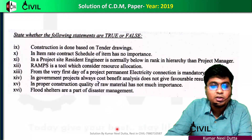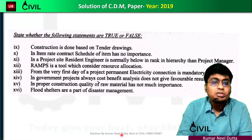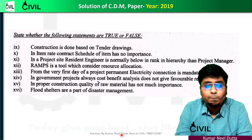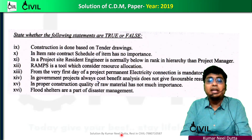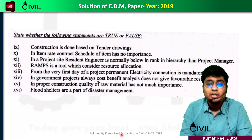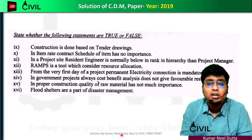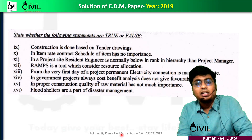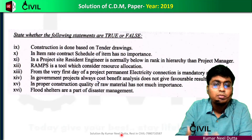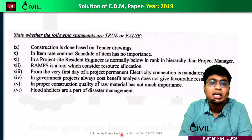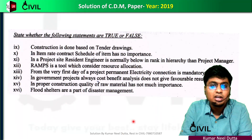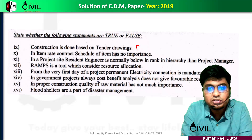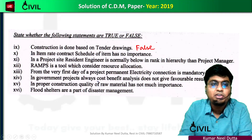Now, true-false questions. Statement: construction is done based on tender drawing. This is false — construction is actually done based on construction drawings, not tender drawings. So this statement stands false.